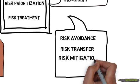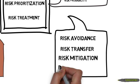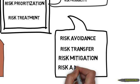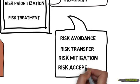Next is risk mitigation — this is the most common risk treatment. The objective of risk mitigation is to reduce the risk impact, risk probability, or both. For example, if the project team is new and does not have prior system knowledge, the mitigation may be to have a knowledgeable team member join the team and train others on the fly.